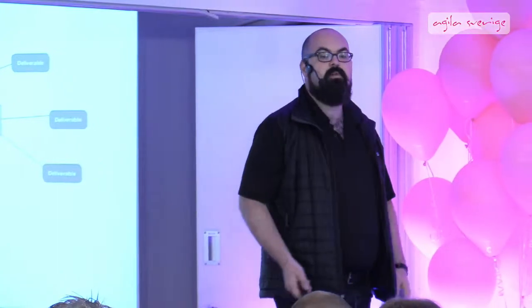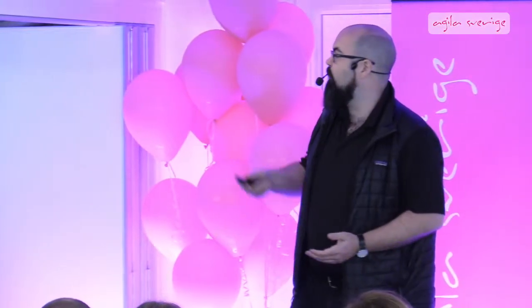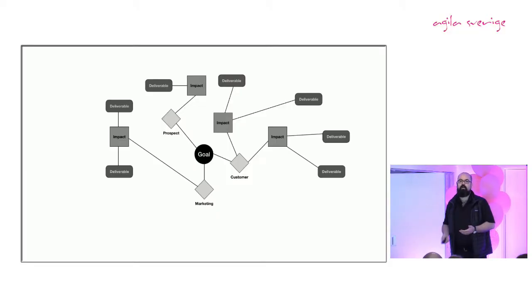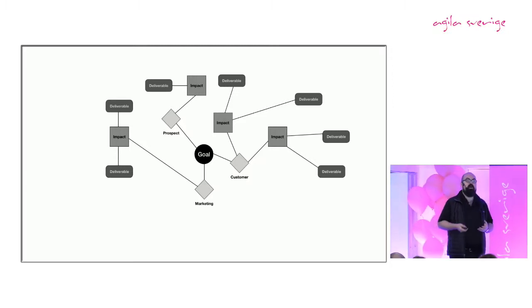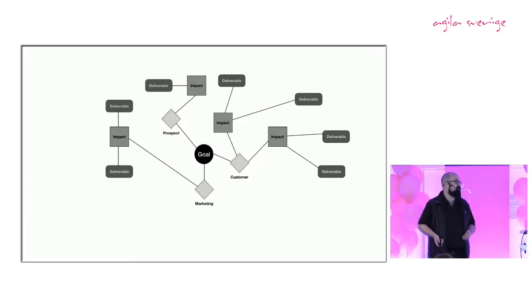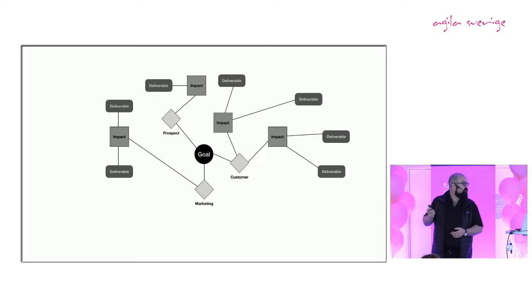And then on the outside of that, all of those things are your deliverables. And this is where in a lot of cases you'll take an existing backlog, you'll run it through an impact map, and you'll take all of those deliverables that are in your backlog and you'll try and connect them to an impact, to an actor, to a goal. And then you can have the conversations with the stakeholders around, well okay, does this add value? Is this driving your goal forward? Is this going to help achieve the things you're trying to achieve or is it not?